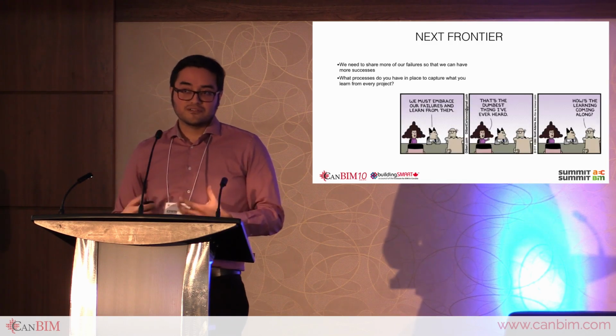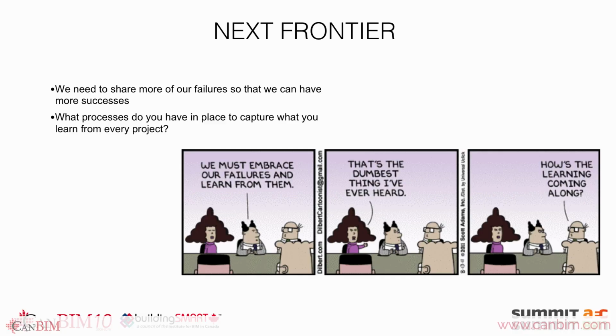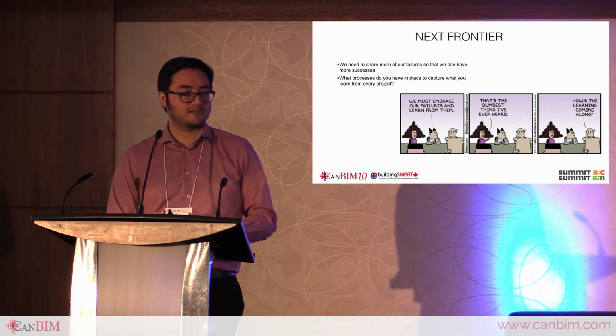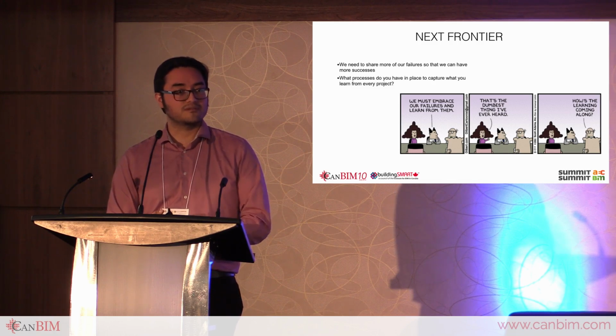Similarly, we need to do more of this, sharing not just the successes but failures, and having process in place to capture these lessons learned in a formalized manner, so that we don't start a new project and just start the learning process all over again. The benefit of doing this is that it's a big data concept of learning from what we track and doing things the most efficient way. So it's not just about tracking, it's not just about having RFIs in a spreadsheet, it's about seeing those business insights, mapping them out to see, okay, where are the issues normally, and how can we mitigate or try to prevent them in future.